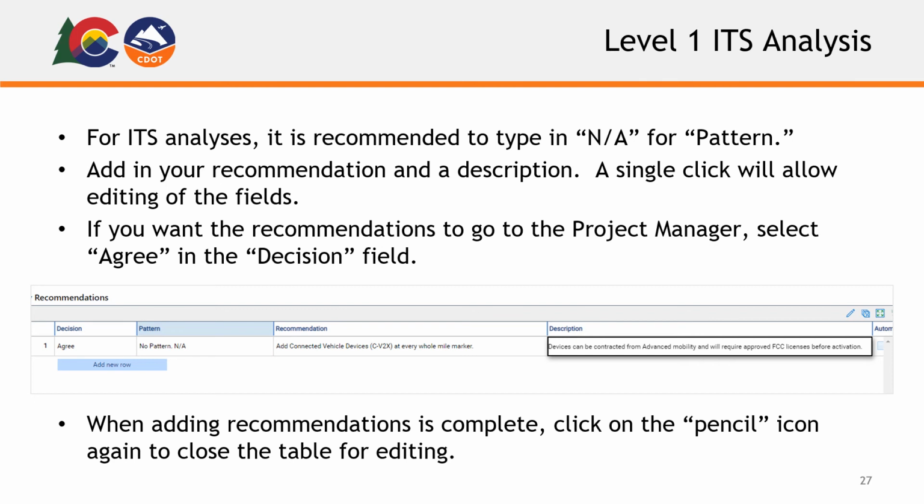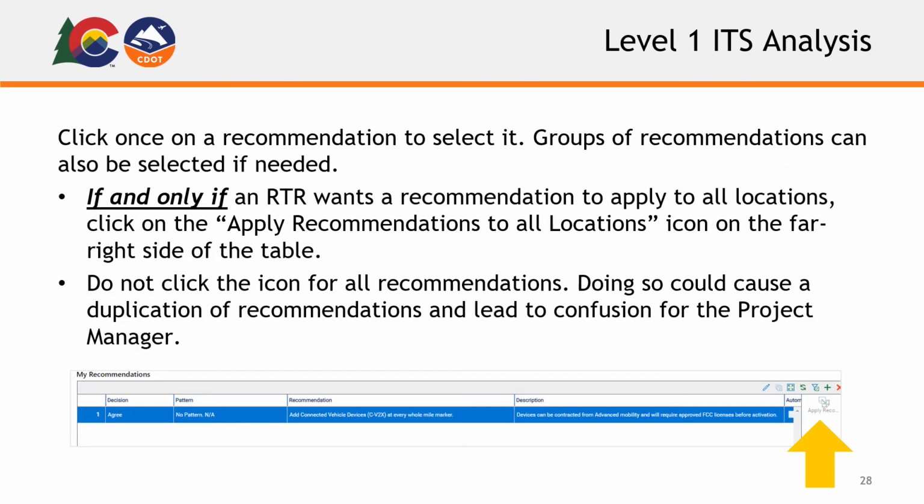A single click will allow editing of the fields. If you want the recommendations to go to the project manager, select Agree in the Decision field. When adding recommendations is complete, click on the pencil icon again to close the table for editing. Click once on a recommendation to select it. Groups of recommendations can also be selected if needed.